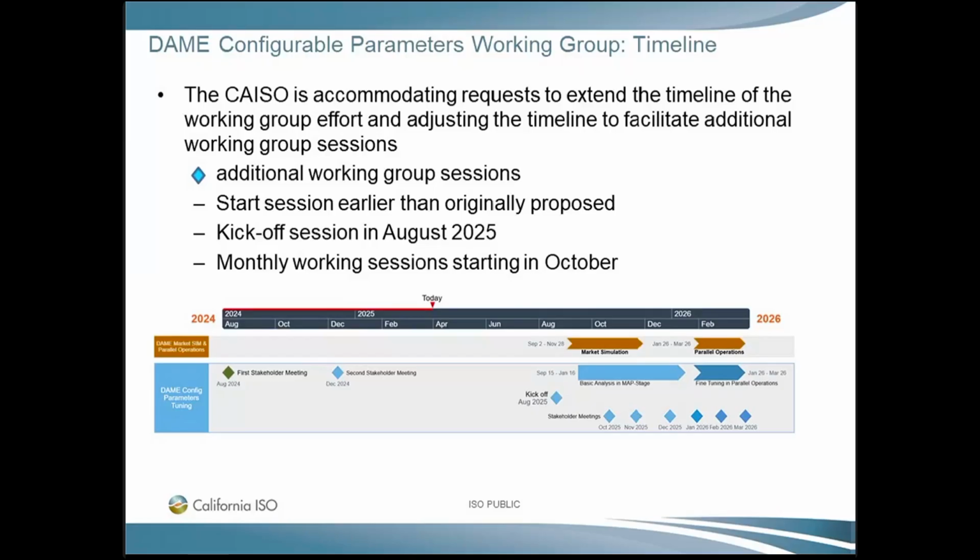And so I would even say that for May 1st effective date, we would back up. And then, you know, if the horizon opens 7 days before May 1st for the day ahead submissions, then we would likely need to set them, you know, even over a week prior to that. So I would say mid-April of 2026 is what our target would be, and kind of the more realistic deadline for having those values.